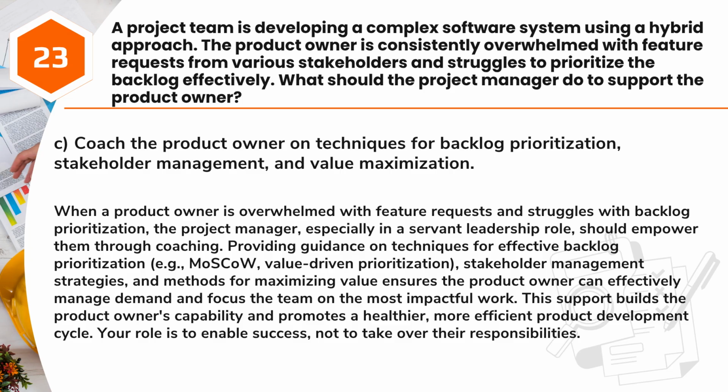Providing guidance on techniques for effective backlog prioritization, e.g., MoSCoW, value-driven prioritization, stakeholder management strategies, and methods for maximizing value ensures the product owner can effectively manage demand and focus the team on the most impactful work. This support builds the product owner's capability and promotes a healthier, more efficient product development cycle. Your role is to enable success, not to take over their responsibilities.